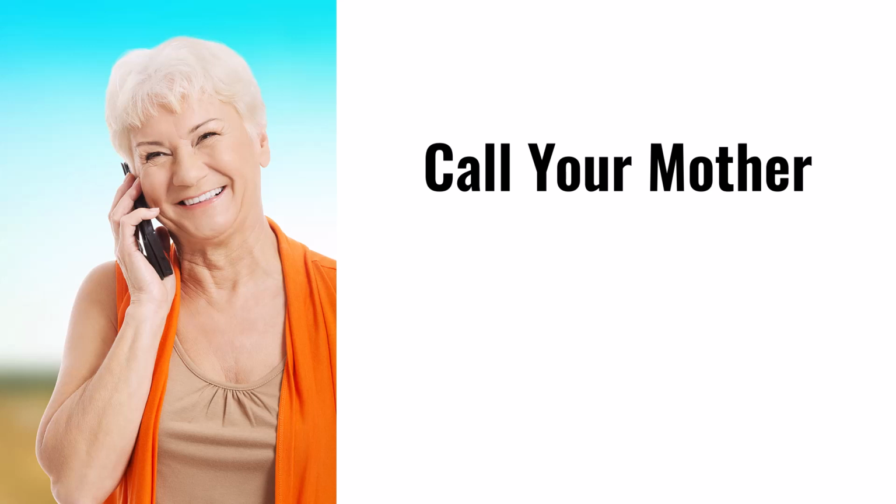In other words, you would fluff the labor hours on your project to include the daily phone call to your mother. You could do the same for supervision. My point is that you need to do your best to verify that your company has included supervision in your project and how to bill against it so that you're not doing it for free. If you're doing it for free, you'll have to rob hours from your installation time, which will make it more difficult to meet your labor budget.